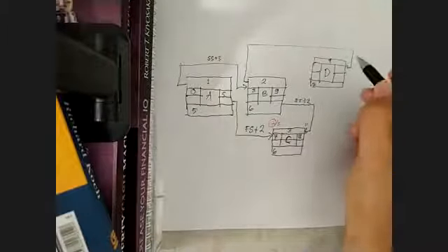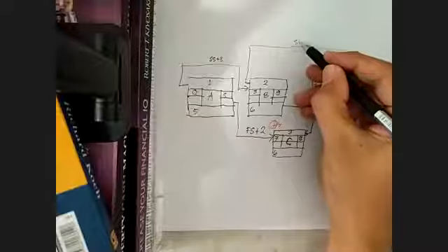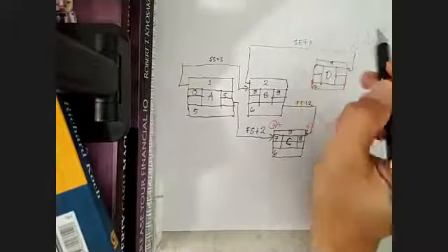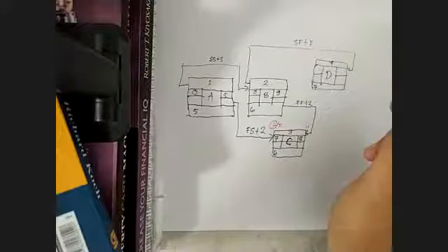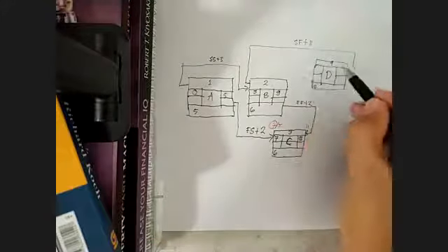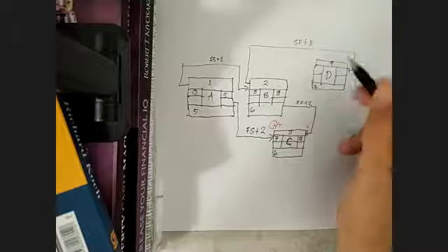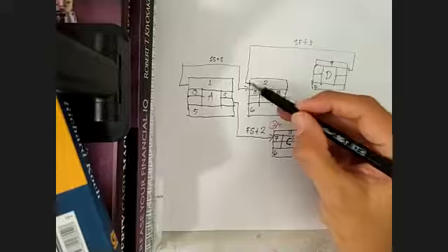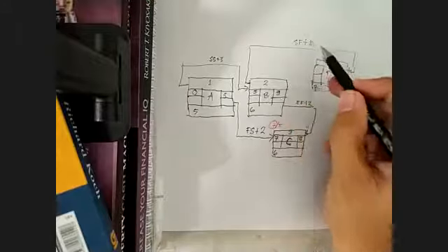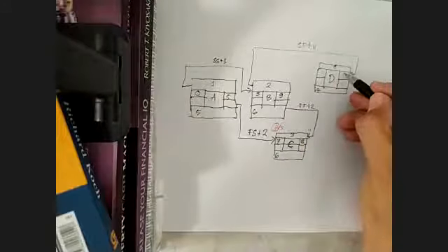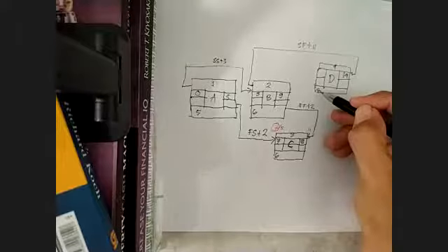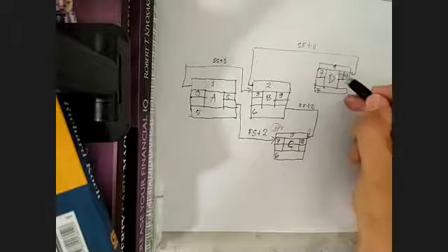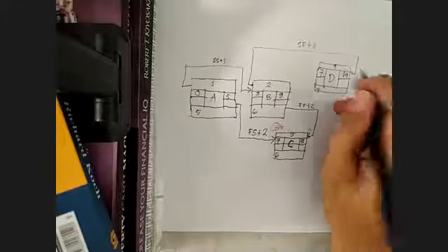SF 2 and 4, and we have to write down the predecessor over here with 11 days. Okay. Since the activity D only has one predecessor, we can directly calculate the box over here. Start to finish 11, increasing with 3, since it is coming from the left side. 3 plus 11 would be 14. 14 decreasing with 7, we will get 7. So the activity D will start at day 7 and finish at day 14.